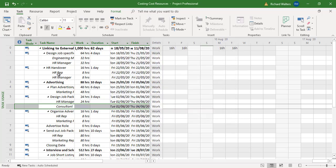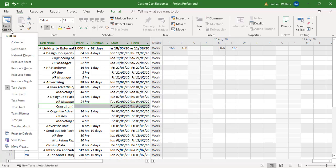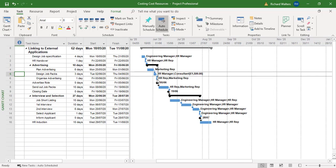And if I go back and change my views, go to Gantt chart view first, I can now see a cost against the consultant. So when you add a cost resource, the cost goes on the Gantt chart against that cost resource. So I can see the consultant cost us £1,500 in this example.